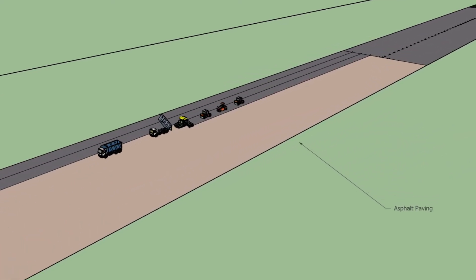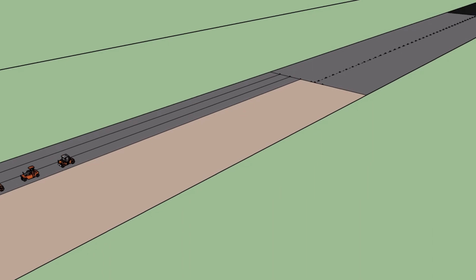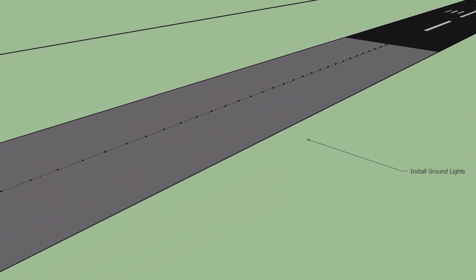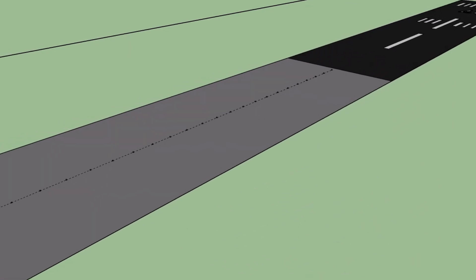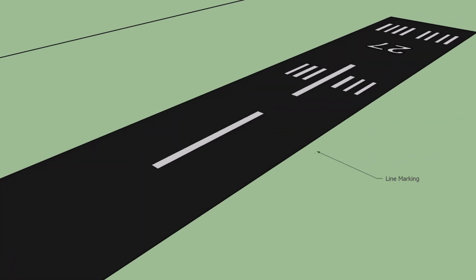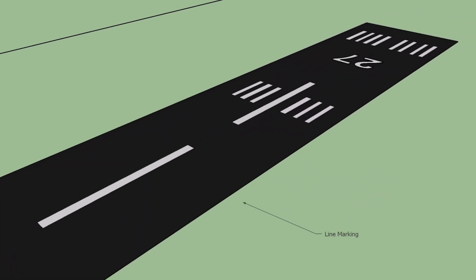Lay and compact asphalt pavement. Core drill and install ground lights. Carry out line markings.